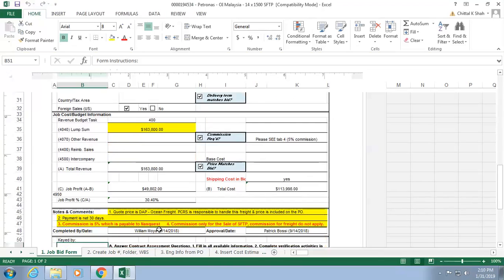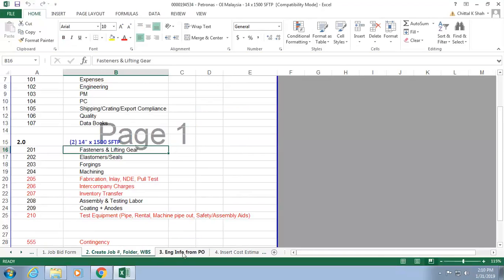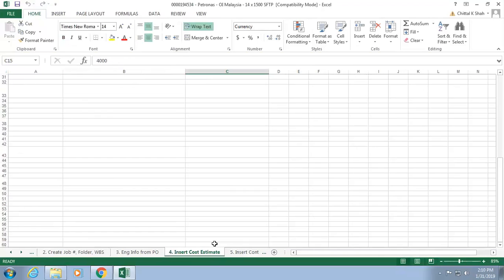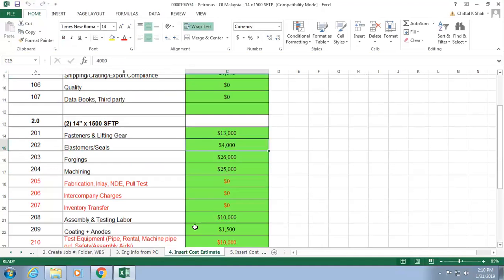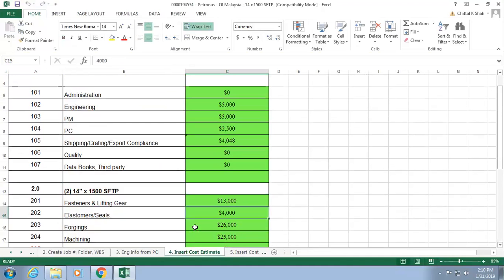The important part I want to show on this, and there are multiple tabs in here. There is some engineering info, work breakdown structure. The important part for this topic is the financial breakdown. So what they do is they take the planned budget. Either they use this breakdown structure to come up with the planned budget, or sometimes take the planned budget and spread it into the work breakdown structure, depending on what kind of homework has been done before.